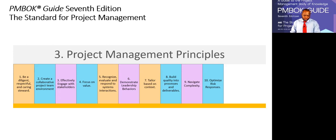Project teams should also monitor not just individual project risk, but overall project risk. An overall project risk is the effect of uncertainty on the entire project as a whole. Overall risk arises from all sources of uncertainty, including individual risks, and represents the exposure of the stakeholders to the implications of variations in project outcome, both positive and negative.